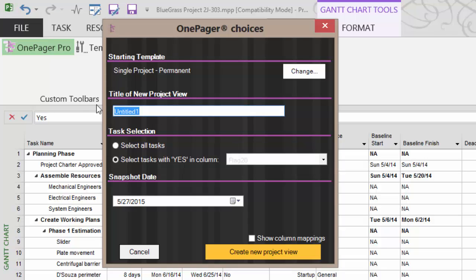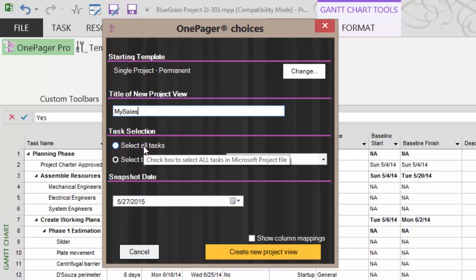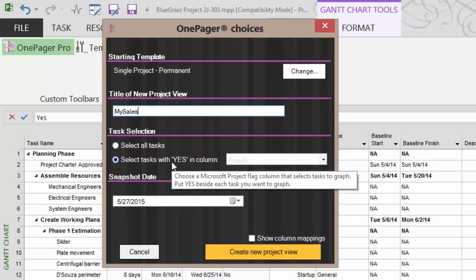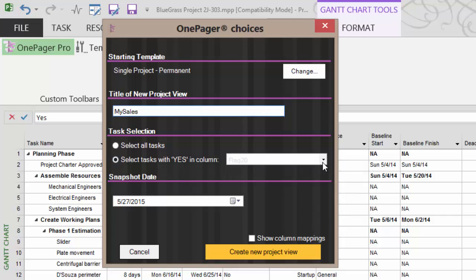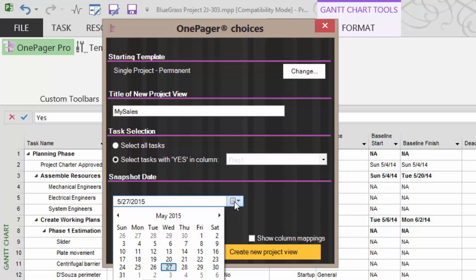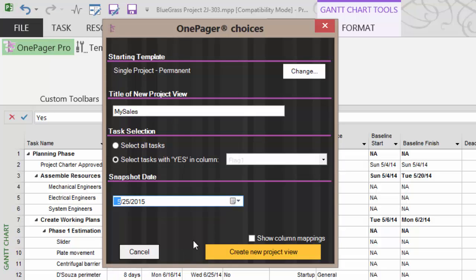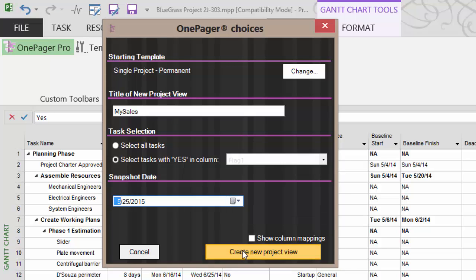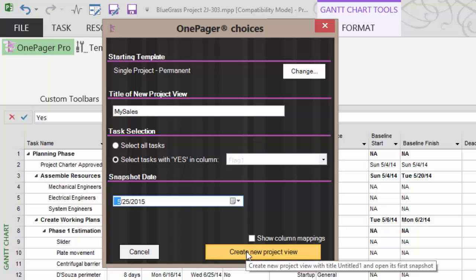We'll give it a unique name. My sales. We also then can have all tasks or just the ones with yes in the column and then of course what field is it that houses the yes. We can also decide the snapshot date. So as of what date is it that we're wanting. So which is the report referring to. And we can go ahead and create the new project view.